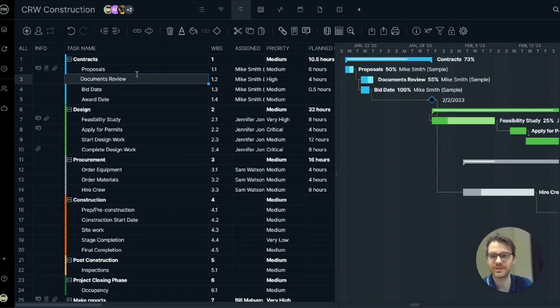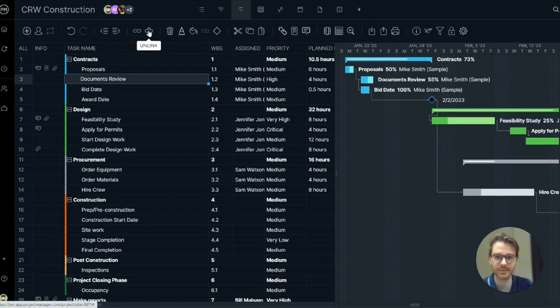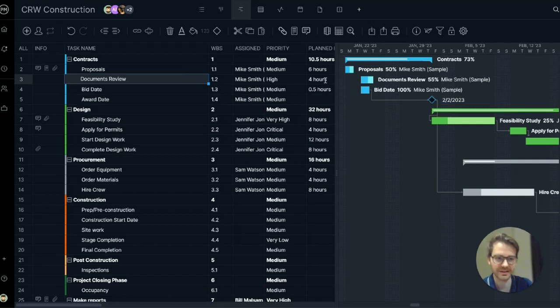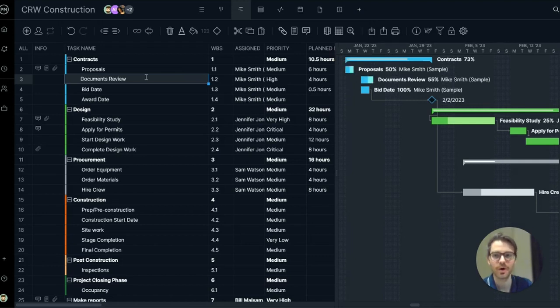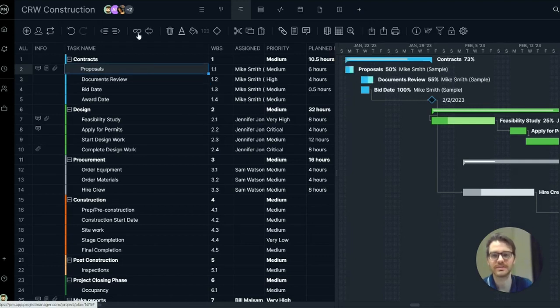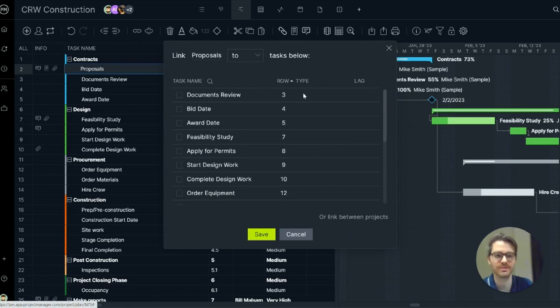To remove a dependency, click the unlink button in the toolbar. To add a dependency, you can drag and drop the timeline or you can use the link button to introduce more options.